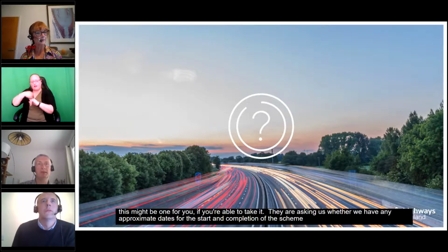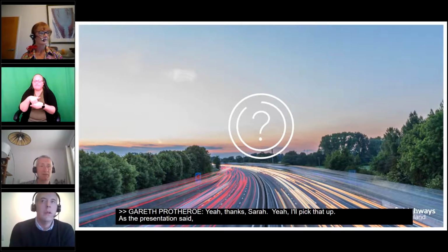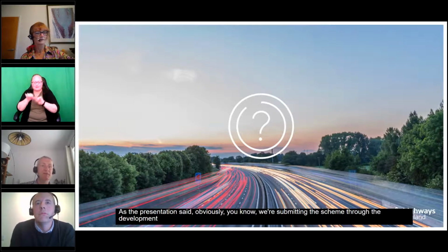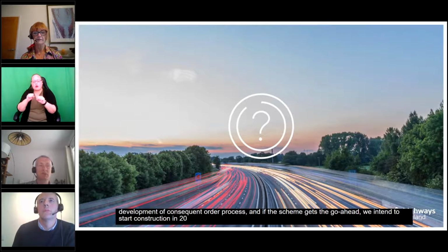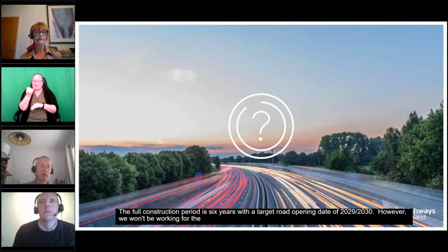Yeah, thanks, Sarah. I'll pick that up. As the presentation said, we're submitting the scheme through the development consent order process, and if the scheme gets the go ahead, we intend to start construction in 2024. The full construction period is 6 years, with a target road opening date of 2030. However, we won't be working for the full 6 years in all areas.